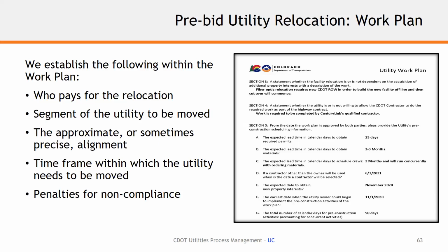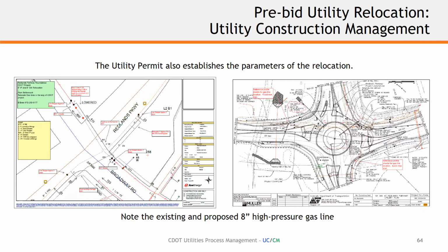And the time frame and the schedule is in the commitment and the work plan and should be in the schedule as well for the utility relocation, or in the spec depending on the timing of the move, of course. But definitely this is a utility coordination effort that is handed over to the construction management team to monitor once the construction side of things starts. And as we show this example, and this is a good example of we've gone through this entire process. We're now designed and we've gone to construction, and there should be a construction inspector, boots on the ground out there. And Joe has a good example here of how things worked and maybe how things could have worked better.